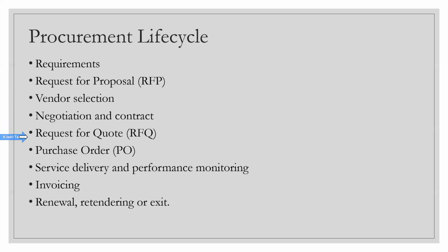So for that, you reach out to the vendor who is already onboarded with Amazon. Onboarded means the contract is awarded to the vendor, and then you ask, hey, what is the quote for, let's say, X amount of Cisco 9410 and Y amount of Cisco ASR, and so on and so forth. You basically share that this is what I need, 10 into X switches, 20 into Y routers, and like that, and you get the quote. And then the vendor will share a quote with you. Okay, request for quote, and they will share a quote with you. Once the quote is shared, it will be vetted. You will definitely vet the quote.